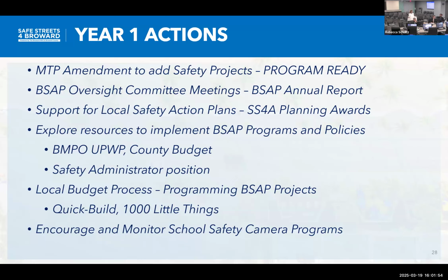Any additions, James? Yeah, if I could just add a few comments. So one of the first things that we can do on the MPO side is get some of the major projects into our MTP, which then gets that in line for funding. And we have what we call our program ready principles, which has 4 components. Any project needs to have a scope of work, cost estimates, coordination with the jurisdictional owners and local community, and a resolution of support from the commission.